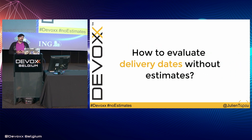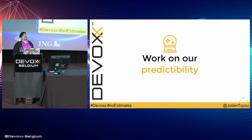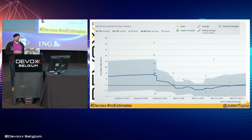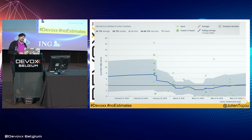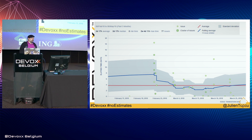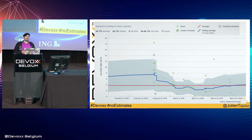Today we'll see how to evaluate release dates without traditional estimation. To be able to do that, we need to work first on our predictability. Perhaps you are using Kanban and Jira and you already see that kind of graph — a control flow chart that you can use in Jira. In that chart, you can see the evolution of what we call the cycle time of a team. The cycle time is the duration between the moment a developer has started a task until the moment it's been released in production. That's something really used in Kanban, but you can use it with Scrum as well.